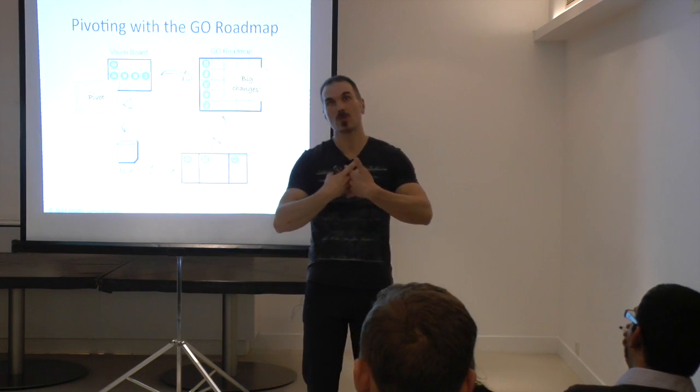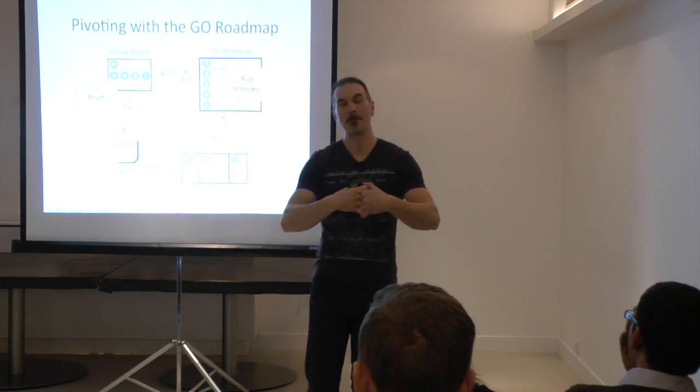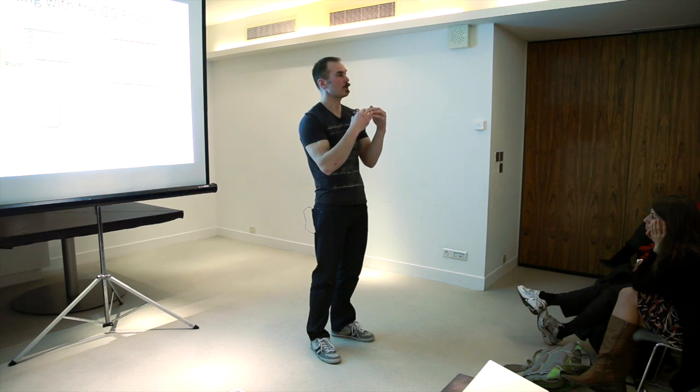And once your product is stabilized, and you've achieved a more steady state, then I would suggest that every 2 to 3 months you review your roadmap.